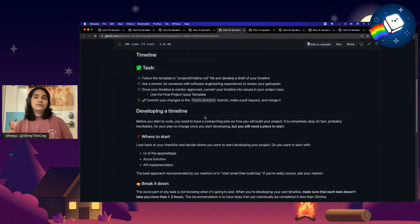So this is the part where they have their flowchart, they know what the technologies are, they've done their research, what problem they're solving, all of the prep work is done. Now they need to figure out what the timeline is going to look like. They don't want to complete the entire project in one day. That's going to be super overwhelming. They also don't want to leave super important features to the last week. So trying to figure out what's a good place to start, what's a good way to organize their deadlines so that they're able to complete a large portion of the foundation of their project within the first 2 weeks, so that even if they run across any problems during the last 2 weeks, they can still have a presentable project by the deadline, basically.